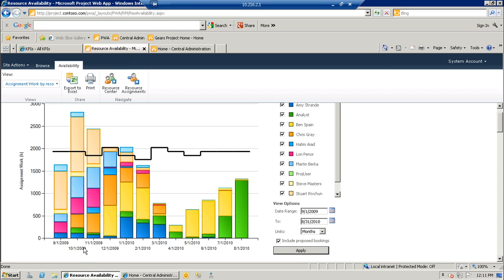So in total, you can see for the month of October that we're over-allocated, or under-allocated, sorry, we're above the bar. So we have more work planned than we actually have the supply to deliver. So what does that mean? It's a nice, pretty picture, but what it means to me is I need to shift some of the work from late in this year, early next year, into kind of the second quarter.